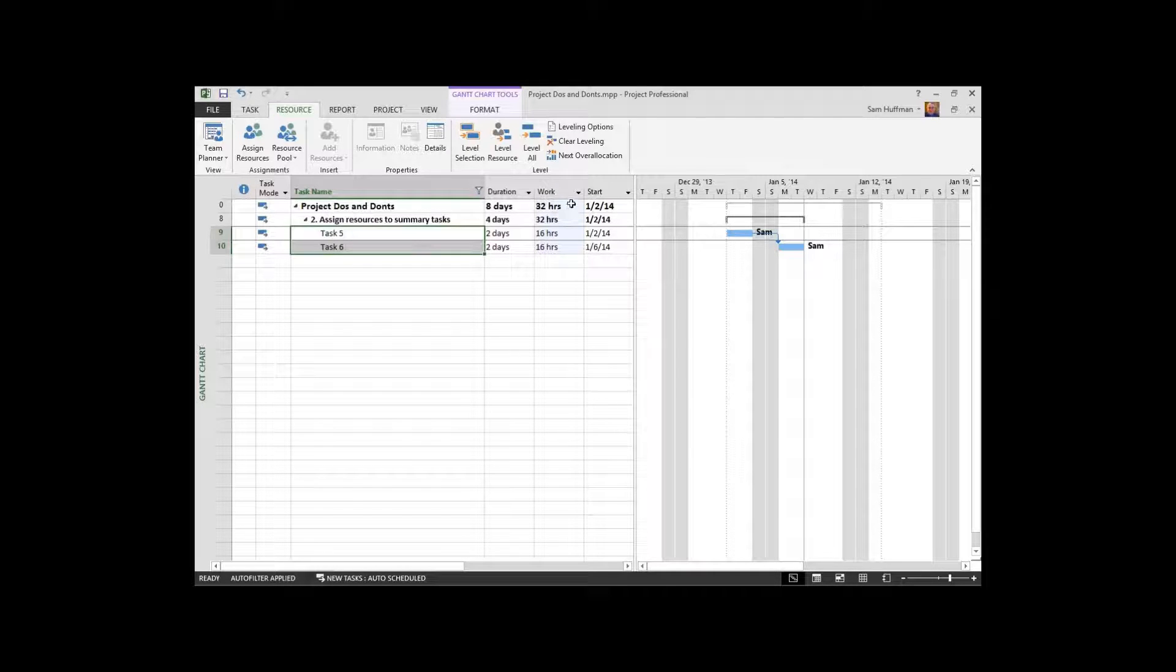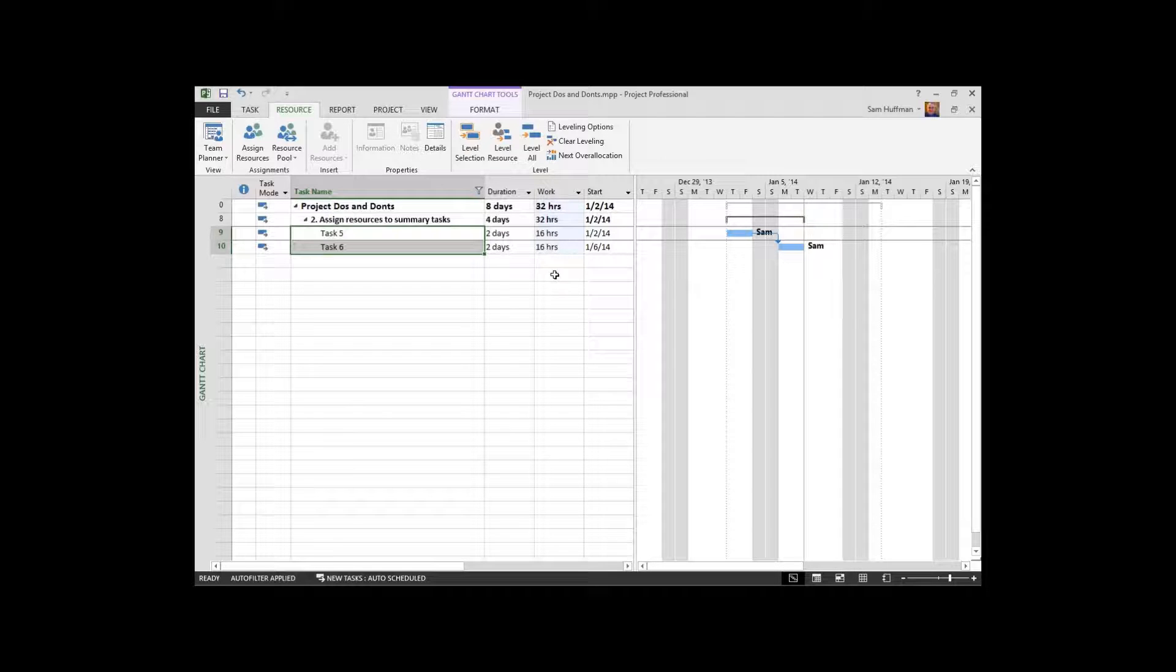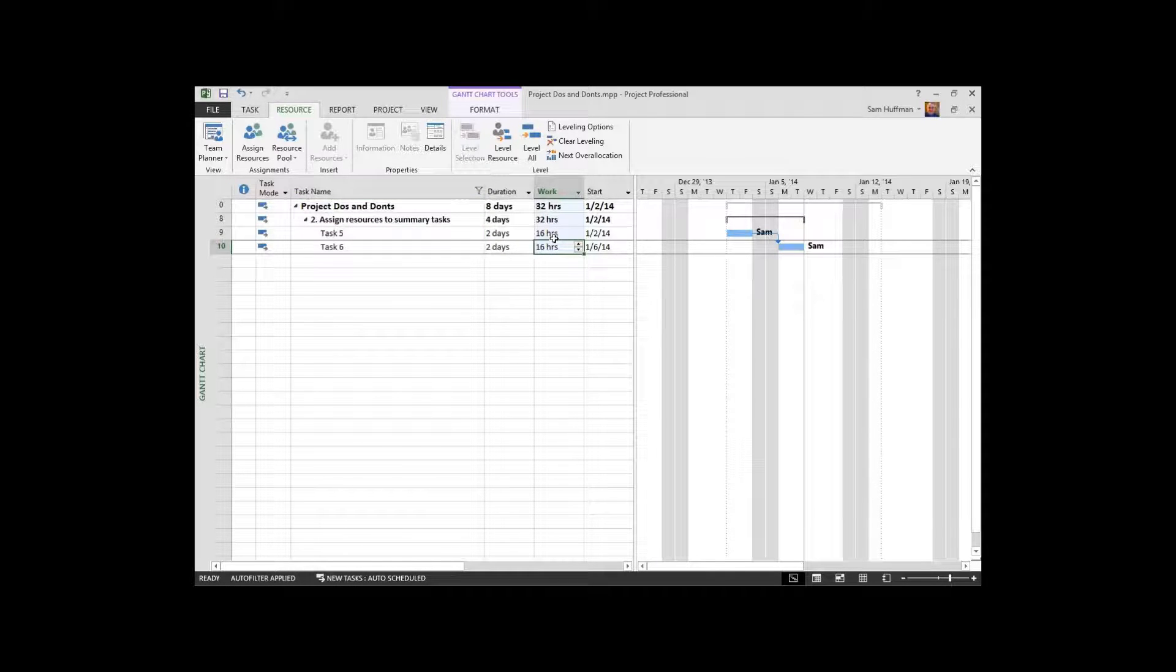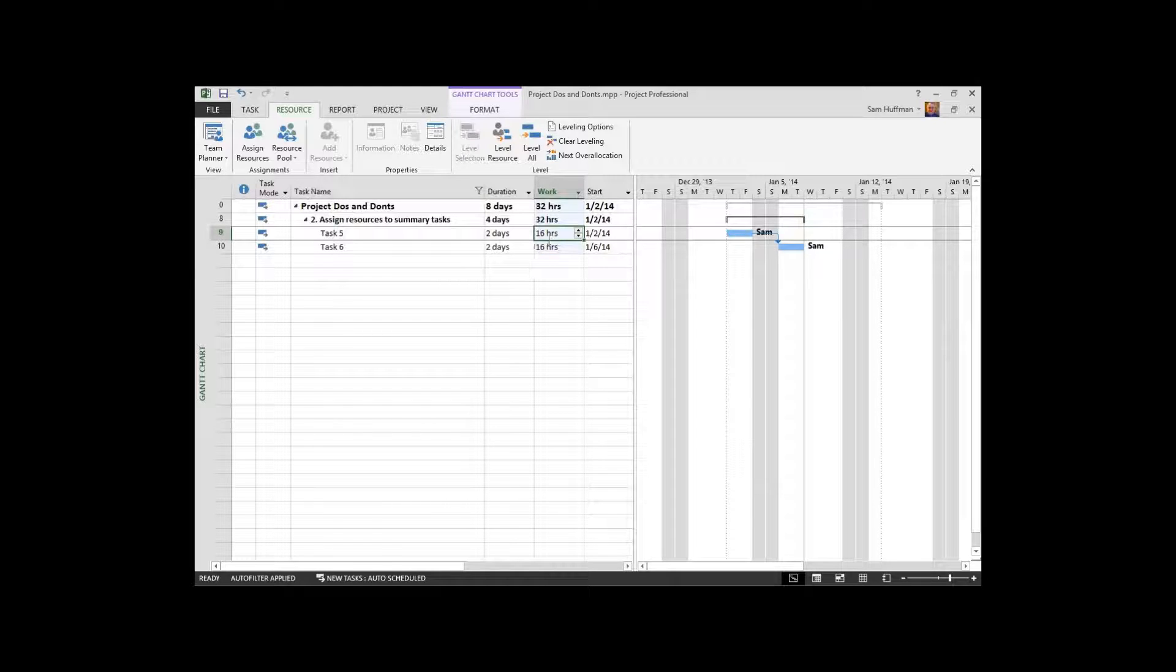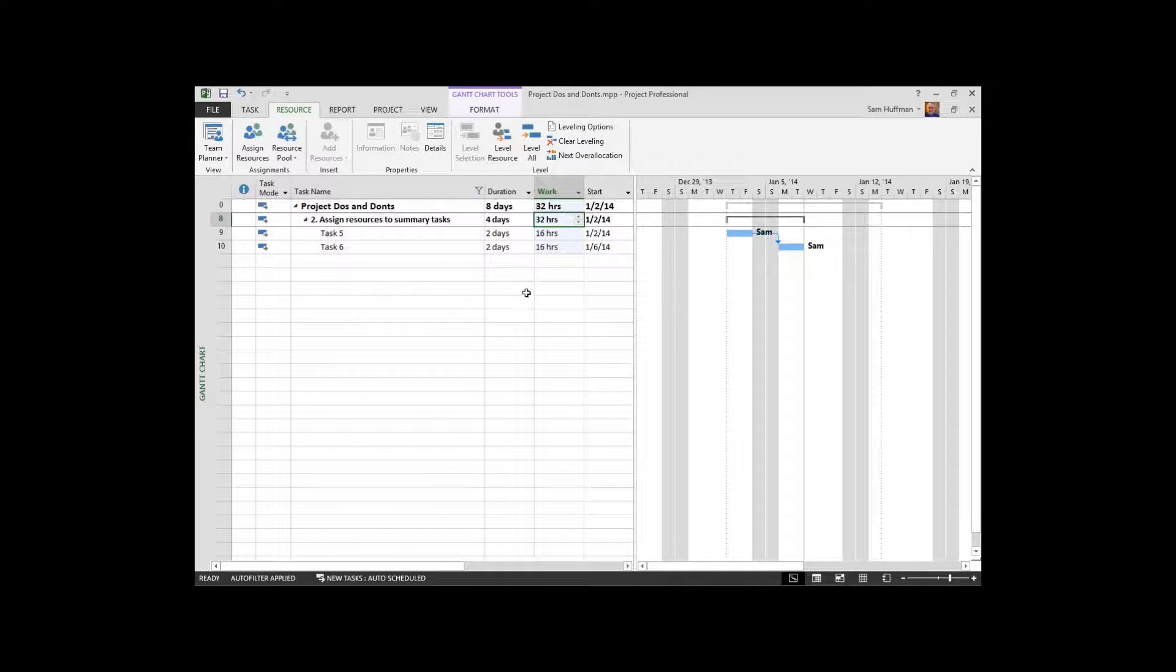I put the work field adjacent to the task fields so that we could see that roll-up that I was talking about in the previous example. So here's a two-day task. Two days, eight-hour days, 16 hours on this task, 16 hours on the first task. That information rolls up to 32, pretty easy to see.